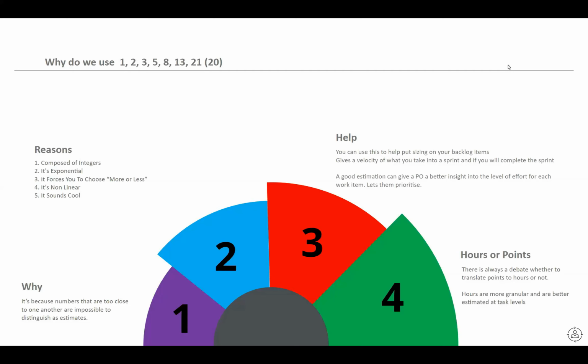Velocity is one of the things that are measured. I know it gets measured and you can't run away from it, but actually, what is that showing you week in, week out? Fine, we know we can complete 50 story points as a team. Well, what if one sprint we only take in 40, for example, but the work was so complex that we had to undertake in that 40? Does that mean our sprint's velocity is reduced? Metrically, yes, but delivery-wise, no. We've still delivered to the goal that was set from our product owner. So they're the things that I look at.